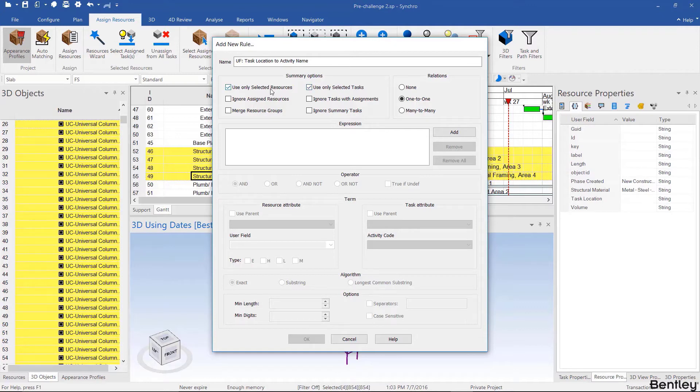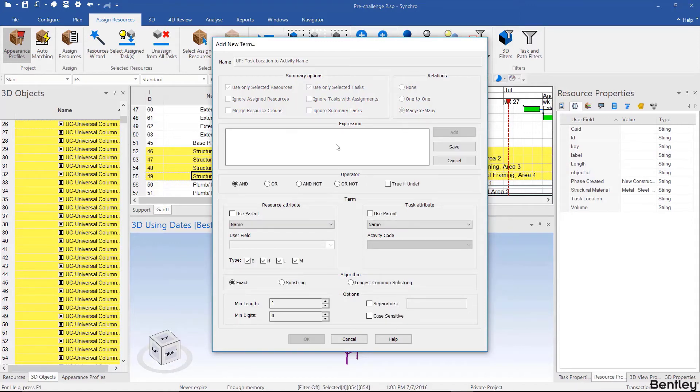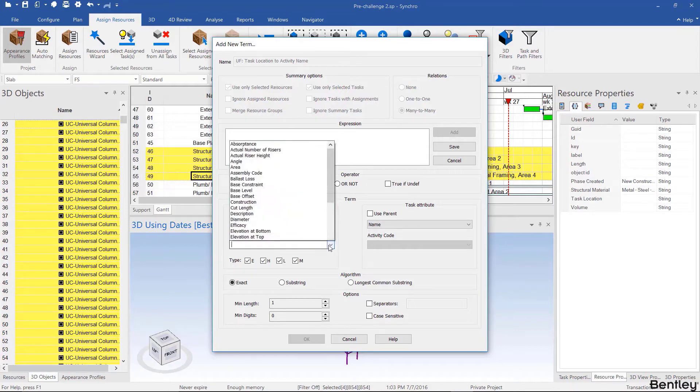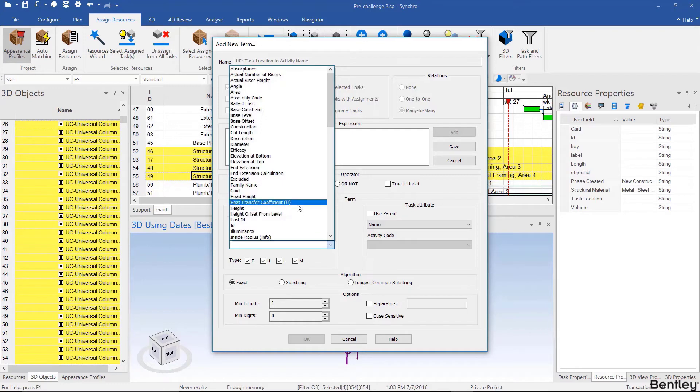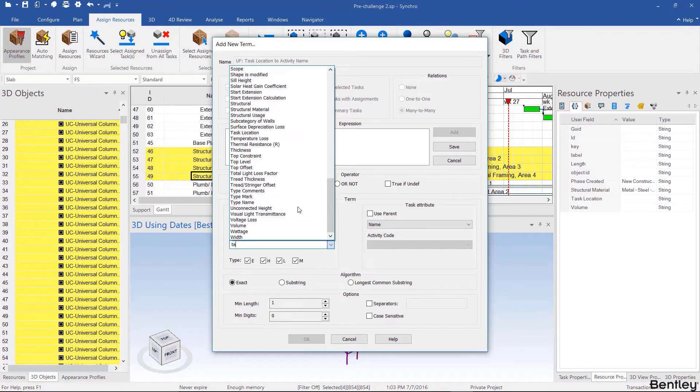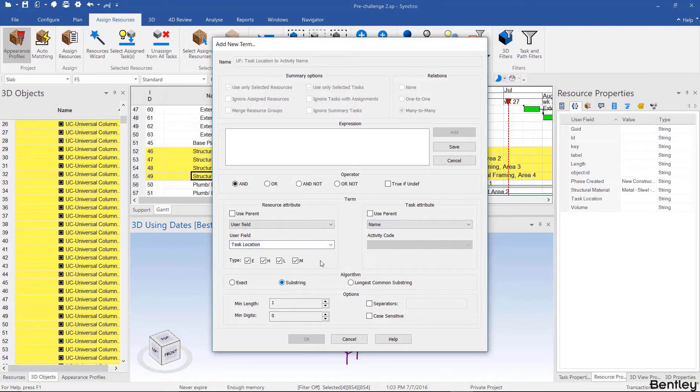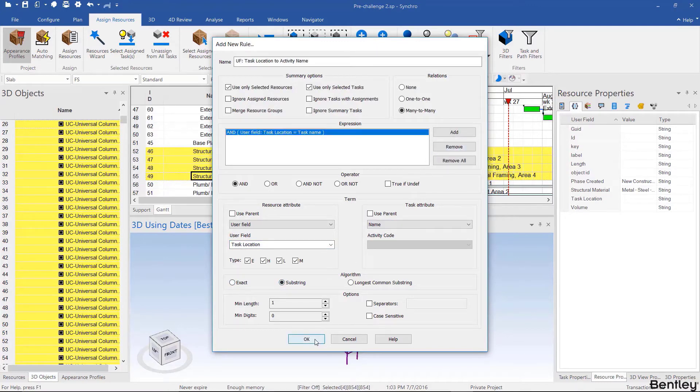We're going to use only selected resources and only selected tasks. That's the controlled auto matching part. For the relations we're going to use many to many. Then we're going to add an expression. I'll come back and explain the rest of these options once we do this. For the first expression we're going to use a user field, you can start spelling it then find it in the drop down. So task location to the name of the activity, however it's not an exact match, it's a substring. Then click save and hit OK.